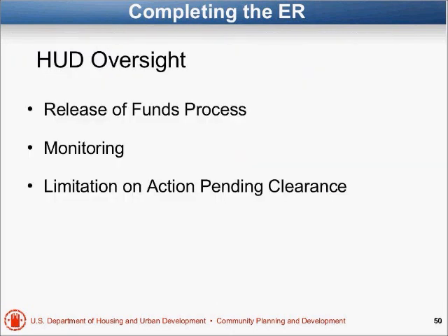They'll wait the 15 days, and then they will release the funds. They will not review your environmental review record. They'll be relying upon your certification that you've gone through that process. Does that mean HUD will never look at your environmental review record? No. HUD goes out and monitors.